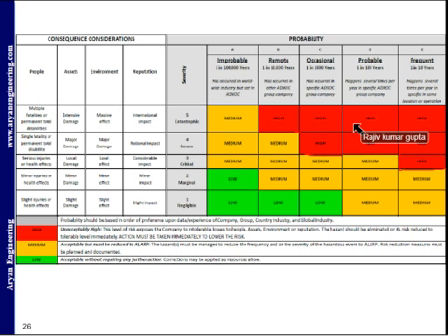So in all cases, when you prepare this probability impact chart, if some of the risks are on the higher side, we can mitigate this high risk to medium or maybe low. Most of the time we try to get it to low, or if that's not possible, then we convert it into medium, because whatever is in high risk is not acceptable to my organization.